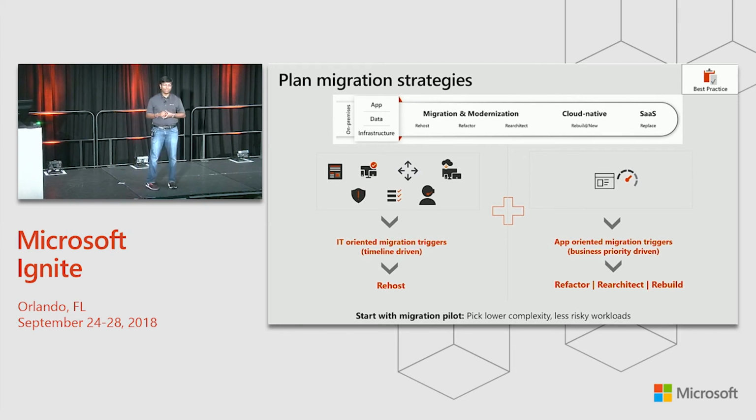The next one is how to plan your migration strategies. Again, most typical question is, hey, what do I actually rehost to lift and shift versus what do I modernize? So a simple guidance is if you have a time-bound deadline or a compelling event in your company which makes you have to adopt the cloud within a certain time frame, go for rehost. And you can think about modernizing it once you're more practiced or more rehearsed in the cloud lifestyle in Azure, right?